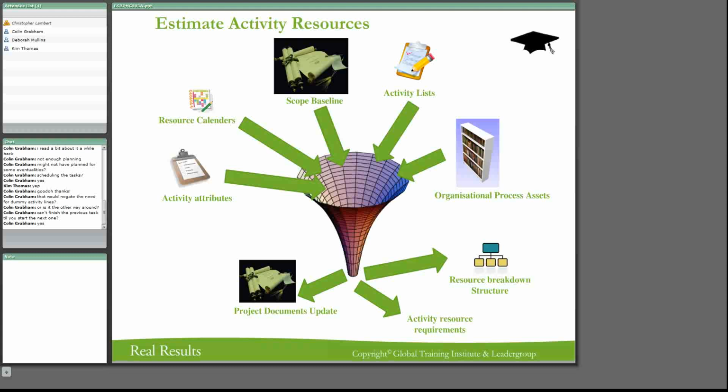What we have here with the activities in the resource requirements is, when we've got to do a particular activity, the inputs to that would be resources, something that you'd need to do it. Another thing would be, let's say one of your projects was to fulfill a particular contract, and in this one you had to do cold roll steel or something. It was a very specific job for building a particular building, and you were going to build a lot of it, and you were going to use some cold roll steel, and you weren't able to get the steel in a particular time because you were going to have to wait for an overseas contract for some reason, and the supplier couldn't give it to you by a particular date. That would be a resource constraint, and we'd have to know that up front.